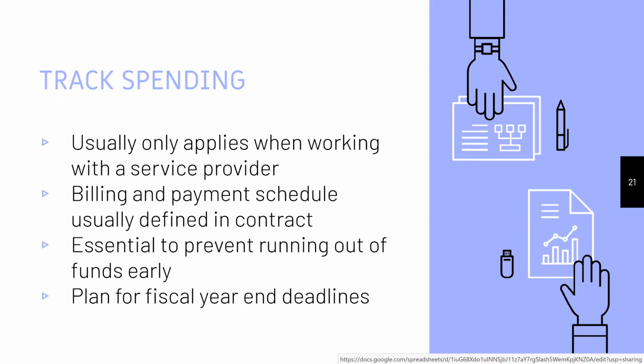and not all at the end. This is really important because if the service provider is giving you invoices every month, then you're spending it out, right? But the task there is to make sure that the invoices you're getting line up with the amount of work that you know the service provider is doing, and that you're all on the same page along that axis.